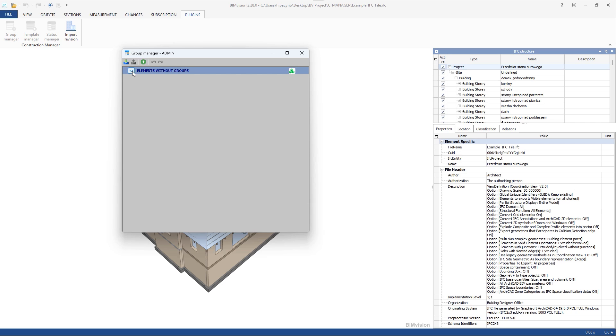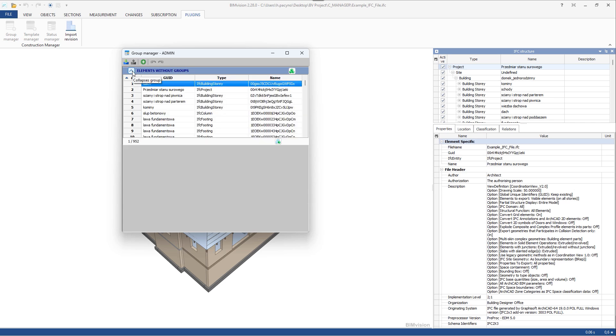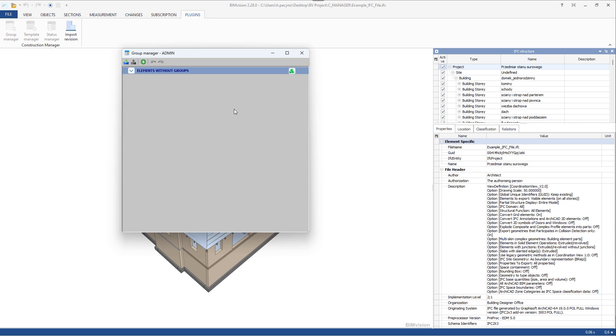In order to control individual works on a construction site, you should start by defining the process. You should define two things: groups of elements and processes of works.